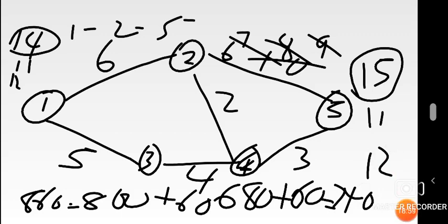Okay, so first of all, you're on day 6. I've identified that yes, we have 2 critical paths, but of course, first let's increase that cost as of day 6. You are on what? You had reached 860 plus another 60, because activity 2 to 5 has a cost per day of 60 that keeps increasing, which leads you to 920 as of now.